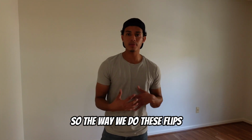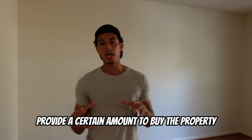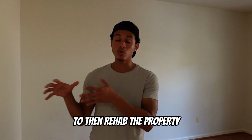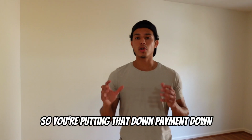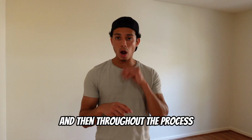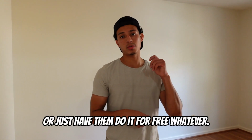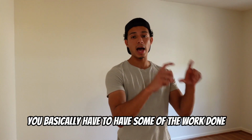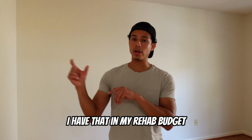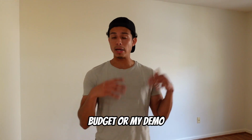So the way we do these flips is we're taking out hard money loans, and they usually provide a certain amount to buy the property, but then also allocate a certain amount to rehab the property. So you're putting a down payment down usually at closing, and then throughout the process, you have to front the rehab, meaning you have to either pay someone to do it or have them do it for free, whatever. You basically have to have the work done. So let's say I do all the demo. I have that in my rehab budget with the lender, and then I go to the lender and say, hey, I'm done with my rehab budget or my demo.